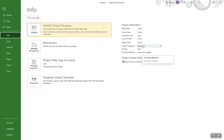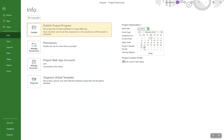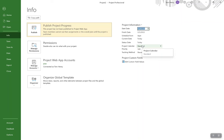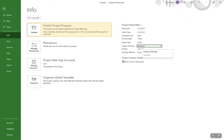You can set up those project calendars. First thing you want to do when you set up your new project is set the start date. I want my project to start on, let's say, March 5th. Some of the information you want to look at is the calendar — you might want to set up different calendars. You've got a standard calendar here, but also a 24-hour working calendar. You can do that in the project information area.